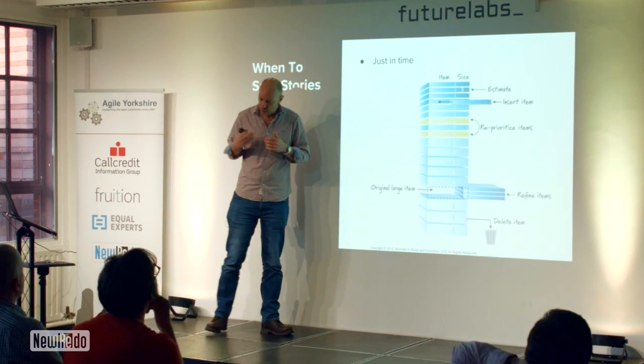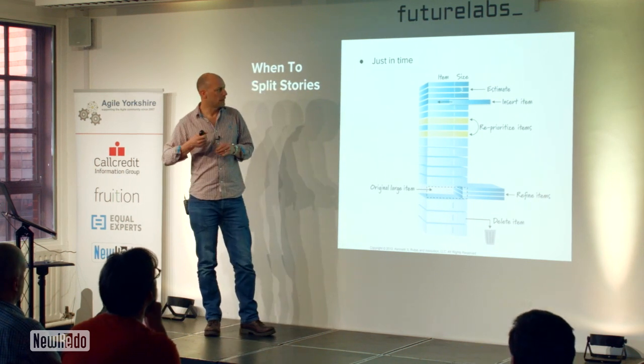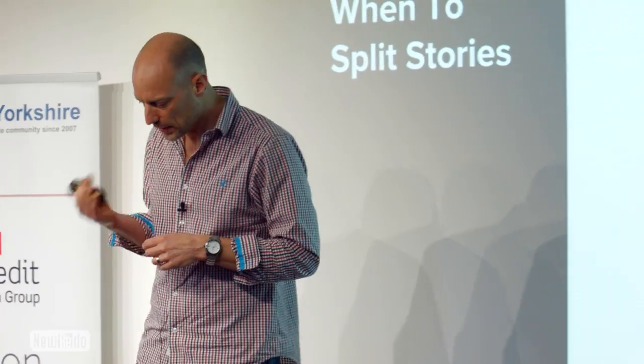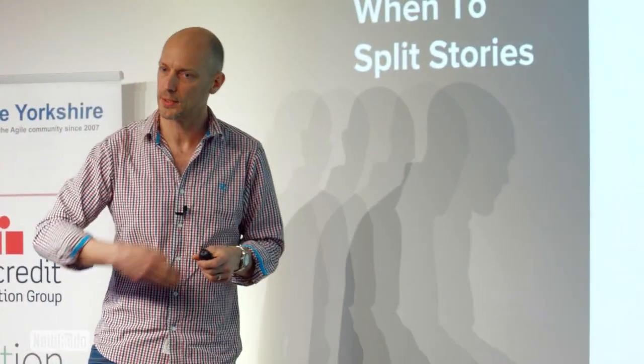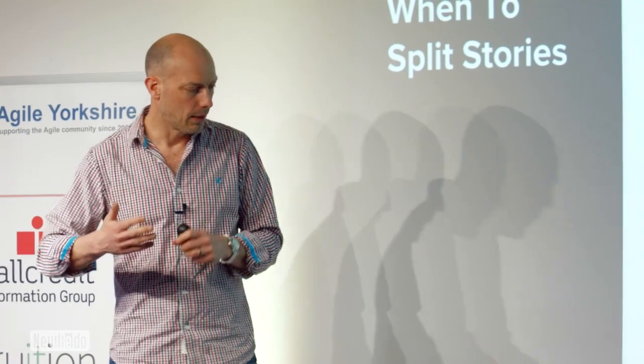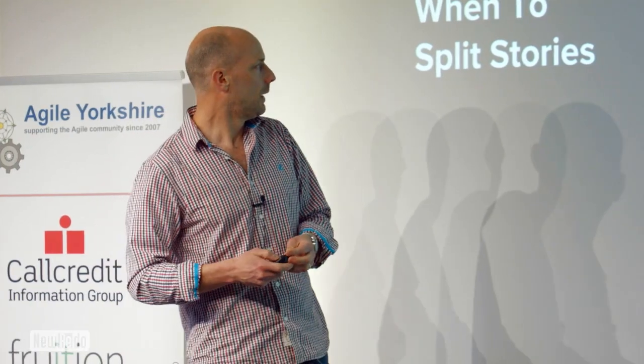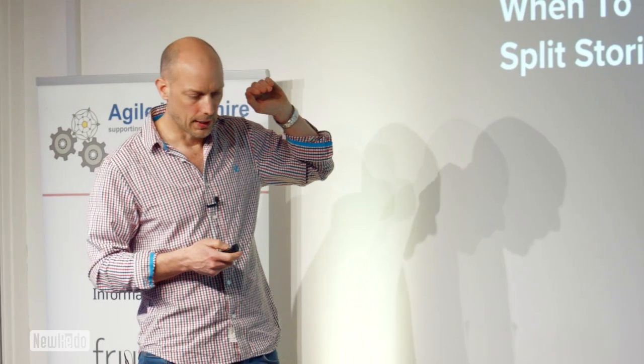You want to have enough stories ready for dev as your team can consume. So if you're working in sprints, and I usually find myself working right up to the wire, getting enough stories ready to go into a sprint planning session. If you're working Kanban, then again, I'm trying to be just ahead of the team, but not too far ahead because of the concept that the decisions go stale. Okay, so trying to keep the decisions as late as possible. So yeah, just in time. Not all at the beginning. Okay.